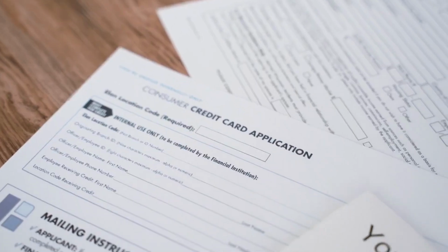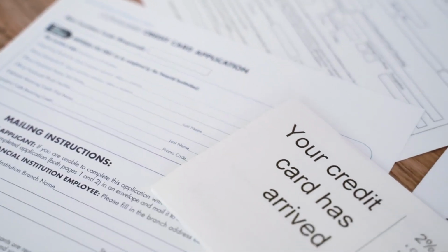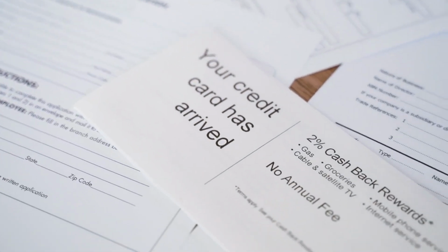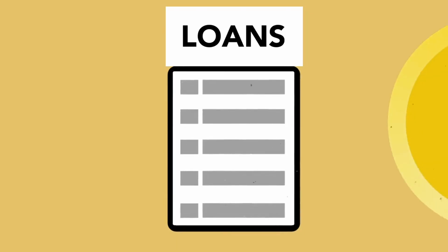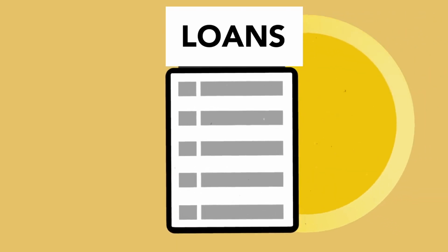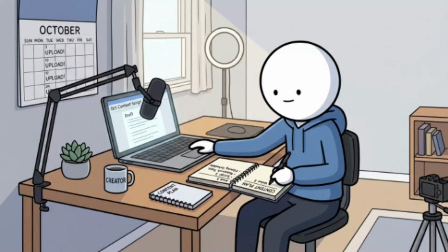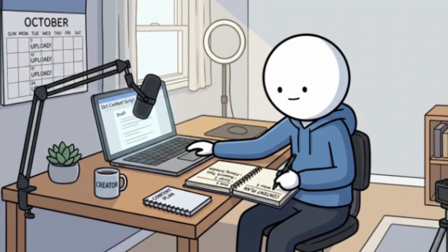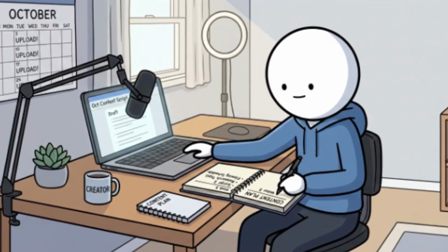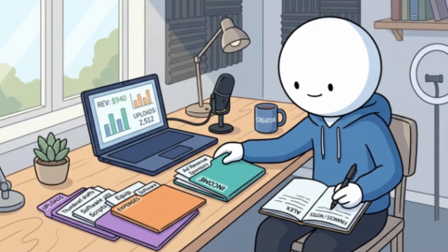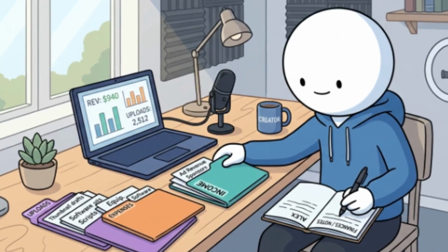Start with Trello. Trello works well for small remodelers or solo contractors. You can build boards for jobs, create checklists for inspections, and track project stages like estimate, materials, in progress, and completed. It's simple. No built-in invoicing, no job costing, and no crew time tracking. But for organizing jobs, it works.